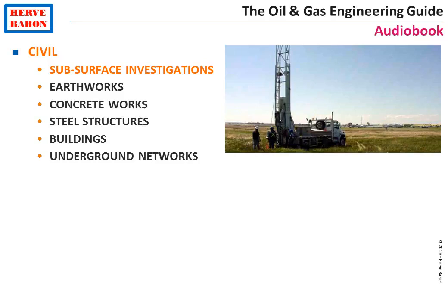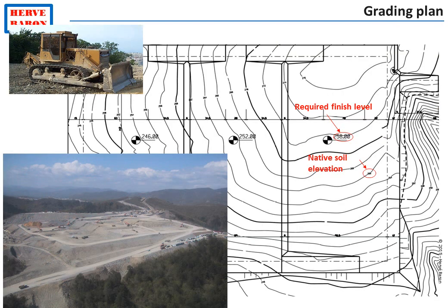The soil investigations identify the depth of the good soil, which will define the plant finished level. At this point, the grading plan can be issued, and the first site activities, which is called site preparation, can start.